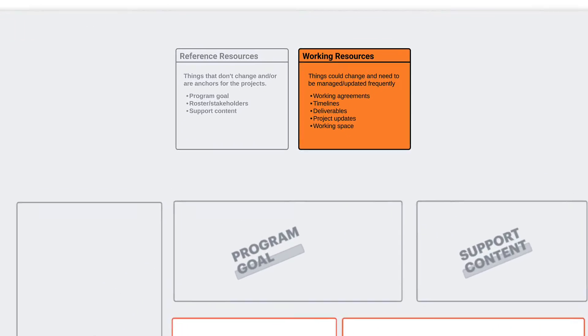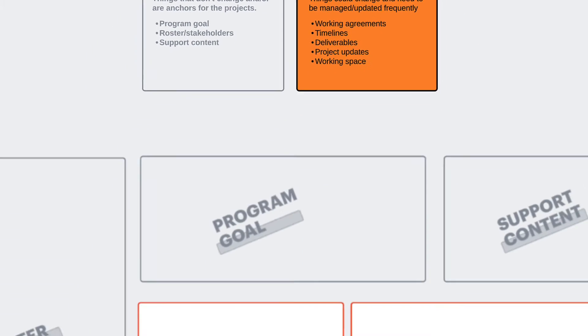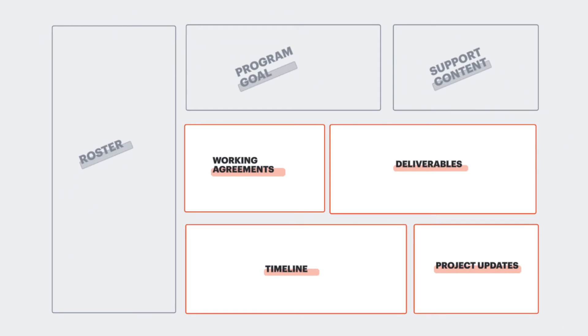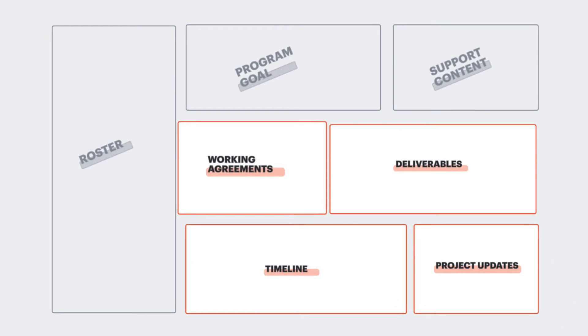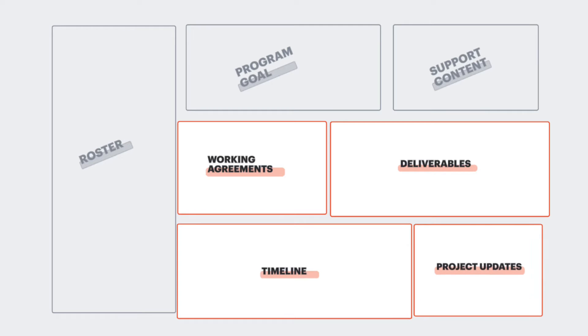Now that the team has what they need to focus, it's important to ensure that everyone is set up to work cohesively together — that is where working resources come into play. This content is susceptible to change and needs to be reviewed and updated frequently to stay aligned and assess risks or blockers. A few examples of these are working agreements, deliverables, timelines, and project updates.